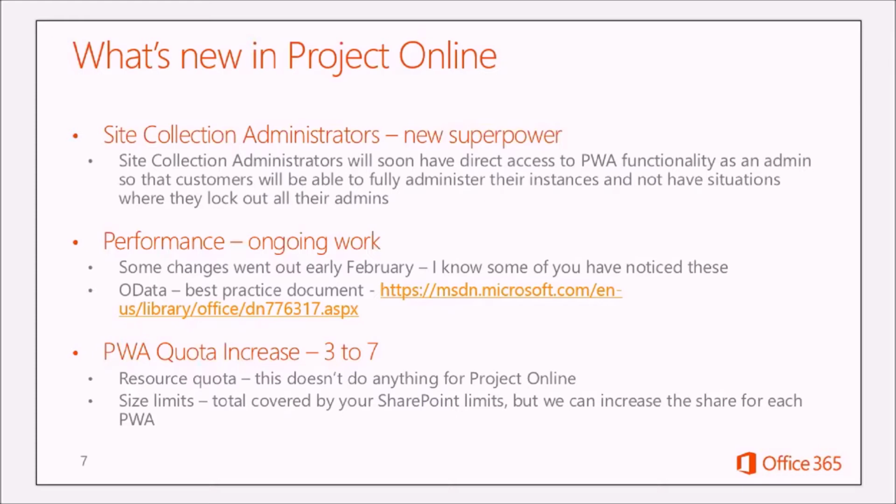On a case-by-case basis, we'll consider if you need a couple more beyond the 7. So, don't think that 7 is necessarily a hard limit if, for instance, you just need that one extra test system. The overall quota in terms of the space used by Project Web App comes under your total SharePoint quota. So, it is not designed for you to have 7 live active huge systems, or if you wanted to increase to 15 and they were all going to be big active live ones, we probably wouldn't accept that